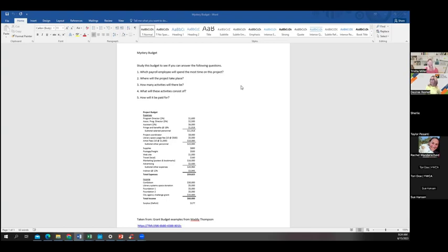But see what's missing here in this little mystery budget? We don't have any information about the project coordinator. Clearly, this is somebody that they're just hiring. They're going to pay that service the $8,000, because notice it's not a percentage of their time. So this is all that they're doing for this particular program. It's just this, they're hiring this person outside. Obviously, notice it's not a salaried position, so you're not including fringe and all that. And notice they did remember to include the fringe, pretty low there at that 18%, which we talked about the other day can run anywhere up to 32. Sometimes it's close to 50, depending on what the organization is.